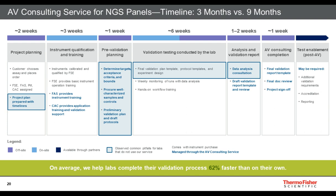During those six weeks, we hop on weekly calls with the analytical validation project manager, going over data in real time. The lab sends us data to analyze, we review it on the meeting, and then discuss the runs for the coming week. After that, it takes about one to two weeks to compile the rest of the data and polish it up, then another week to get a finalized analytical validation report. There are certain things Thermo Fisher cannot do — we can't help with accreditation or clinical reporting; those remain the lab's responsibility after our AV service.